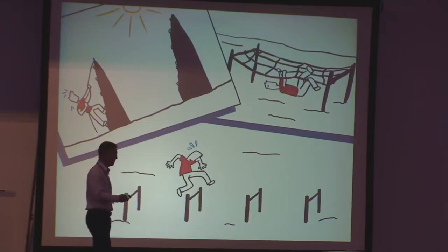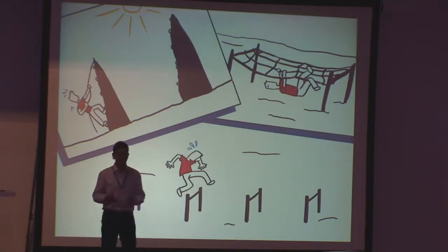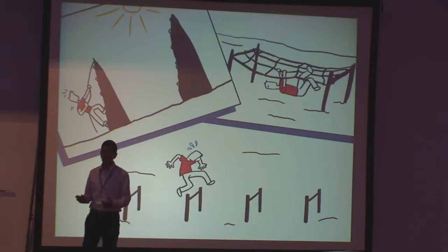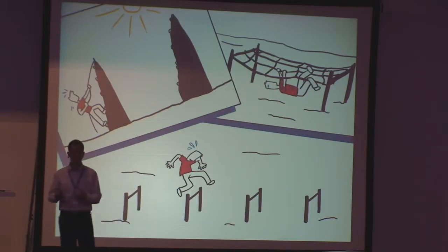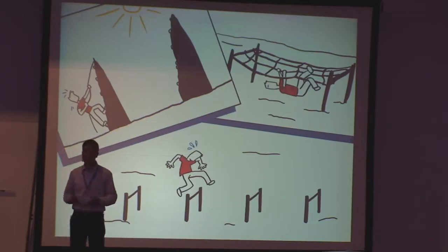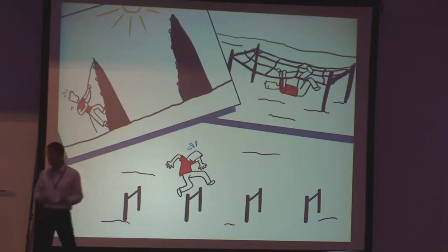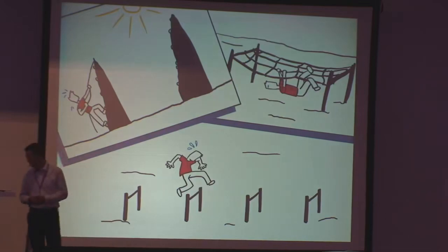So the outcome of that is that some of our teams are doing grooming, and some of them are not. Some of them have something that's called grooming, but what they're actually doing is more of a problem-solving session where they're breaking up an epic story down into its component stories. So it's not really grooming, it's more of a deconstruction meeting. The result of this has been more one-on-ones with product owners that are not happening during what we referred to as the grooming meetings.